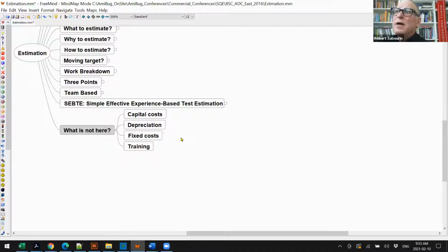So the new personnel thing is, unfortunately, I basically will start collecting new data again. So I'm going to use the old data for 2 or 3 sprints as a heuristic, because it's going to be a good guess, but I start collecting new data from scratch. Any major change of the team, if it's Scrum, it'll be when the team starts. So if your team changes every sprint, SEBTE won't work for you. I'm sorry, if it's different teams all the time, this method won't help you. This method really depends on the teams.